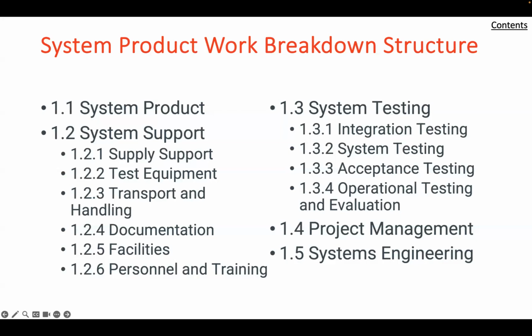The collection of project costs down to the component level and their distribution among the principal phases of project development, engineering, and fabrication is essential also for contributing to a database which is used by the organization for estimating the cost of future projects. For new components, new estimates must be developed by adapting the previous experience cost of items directly comparable to those in the projected system at the lowest level of aggregation for which cost figures are available.